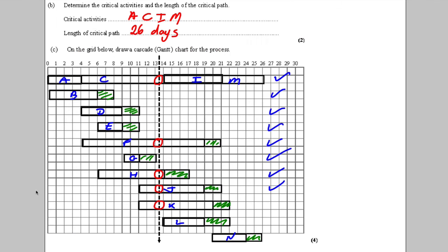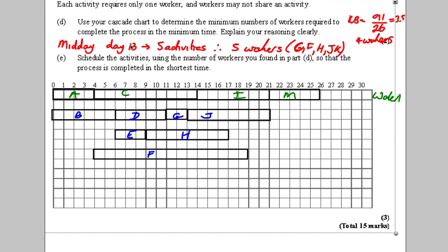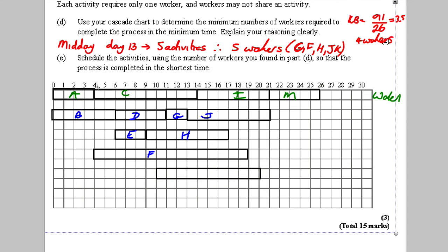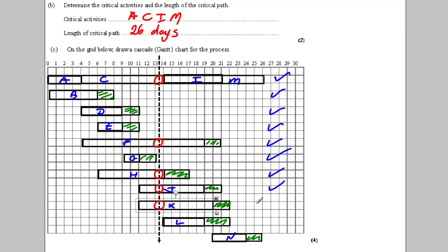So we've done G, and we can go for K. Now I could do K between 10 and 20, 10 up to 20. From here, from 10 all the way up to 20. There's no harm in that. So that's K. Going back here, I've done K.